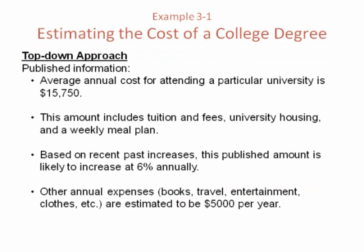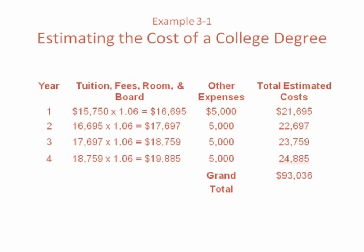Here's an example of using the top-down approach. If you look at a particular university's published annual average costs — say $15,750, including tuition and fees, housing, and weekly meal plan — and you noticed that costs had increased at 6% per year over the last several years, you could extrapolate into the future how much that's going to cost, adding other expenses like travel, entertainment, and clothing. A top-down approach to estimating the total cost of an education is shown here. In year one, tuition is multiplied by 1.06 — if costs were $15,750 this year, they'll be $16,695 next year, and again multiplied by 1.06 the year after.